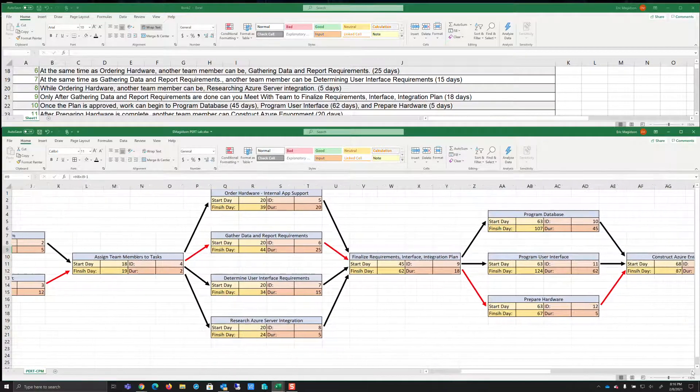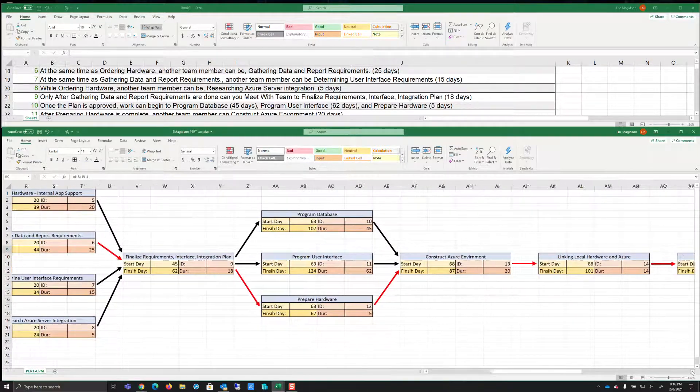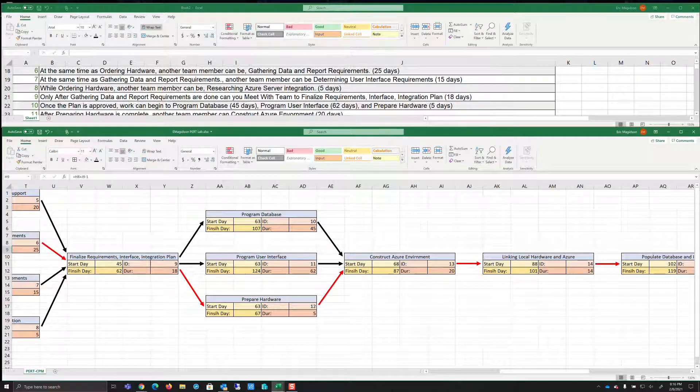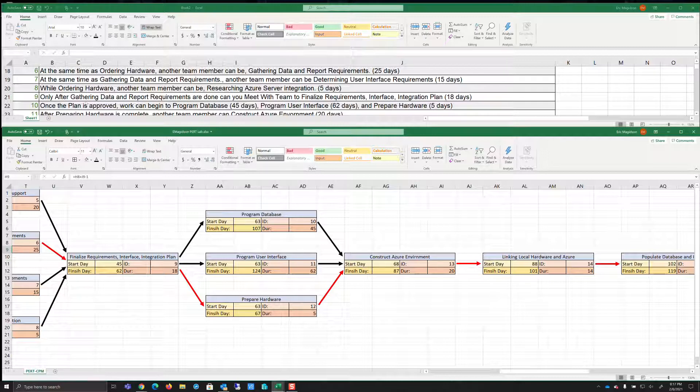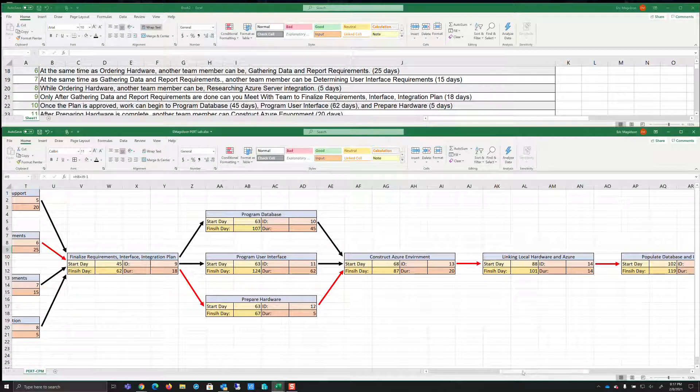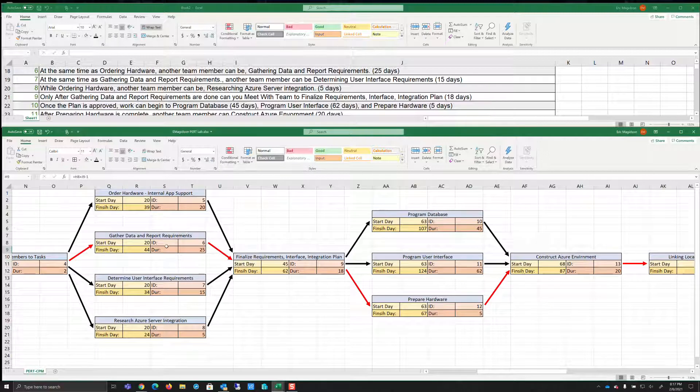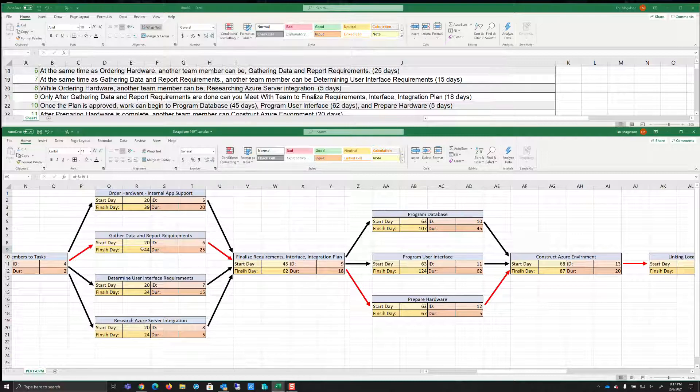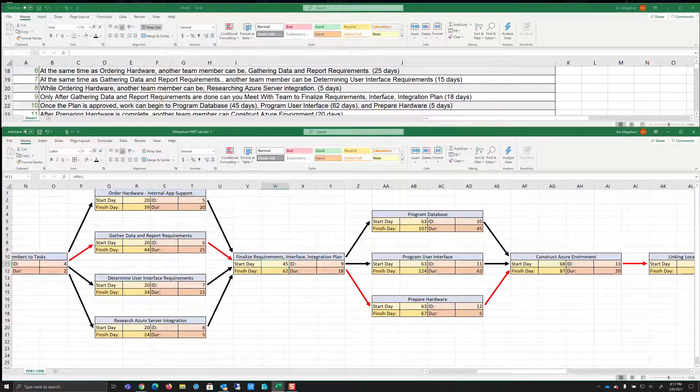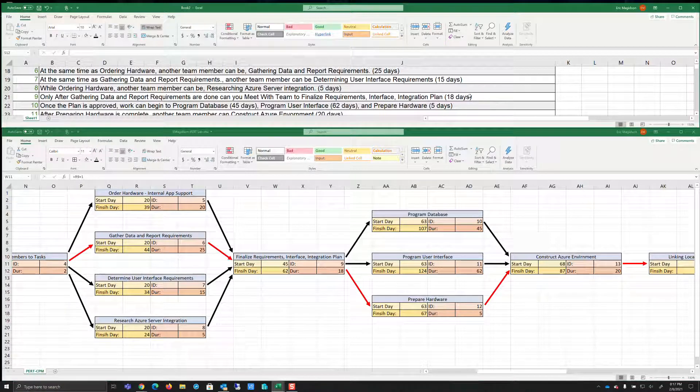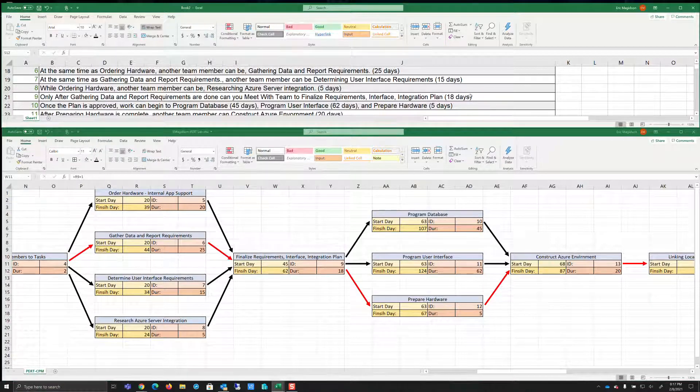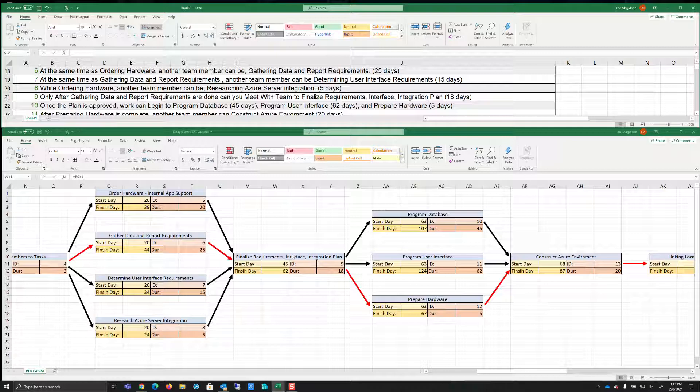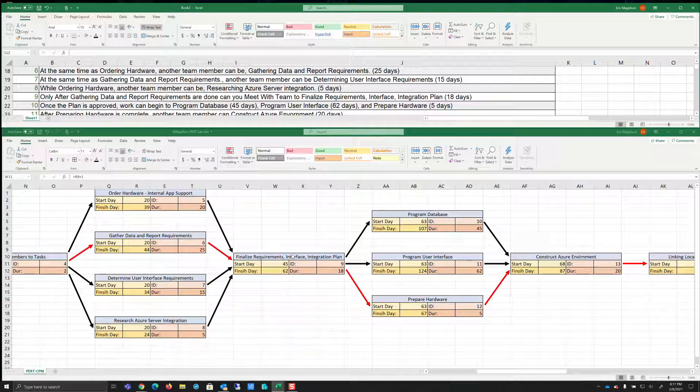I'm going to move this all the way down here so I don't have to move it each time. Now at 44, which was research Azure, then it says only after gathering data and report requirements are done. Now after gathering data and report requirements. So if you notice that happens to be, again, our longest days through these consecutive tasks, so we know we're going to start on 45 days, right? And it says only then can we finalize requirements interface integration plan of 18 days. Now notice all of these are put together with 18 days. You could technically break these down into three different projects if you wanted to. I've left it as one project, 18 days, just to give you an example.